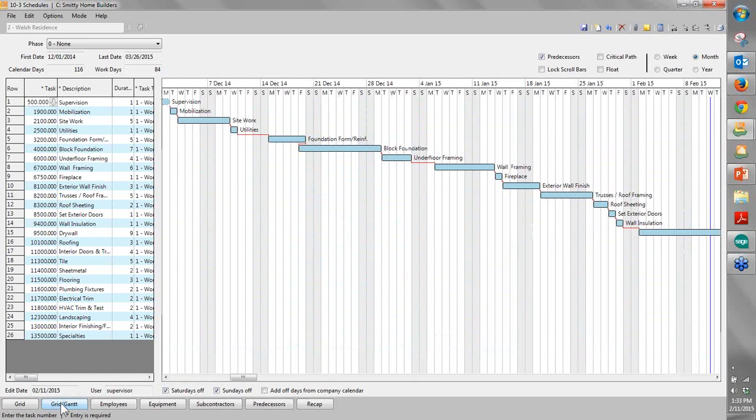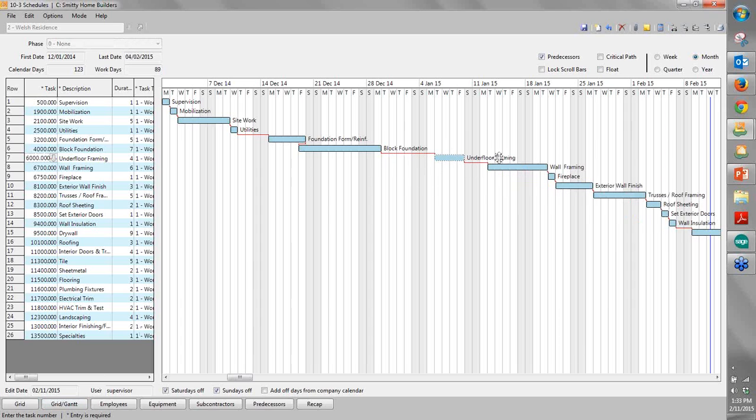So you're going to set that due date. But as you know, things change throughout the project. They've asked for wood to be imported from Peru, and it's going to take a little while. And they have all these exceptions that come up. They can't make a decision on the lighting packages, whatever it might be. So the schedule is going to change and keep moving, so one of the things with our scheduling package is not only can we move the items around when things get delayed, but we can also make a note of why those things moved.